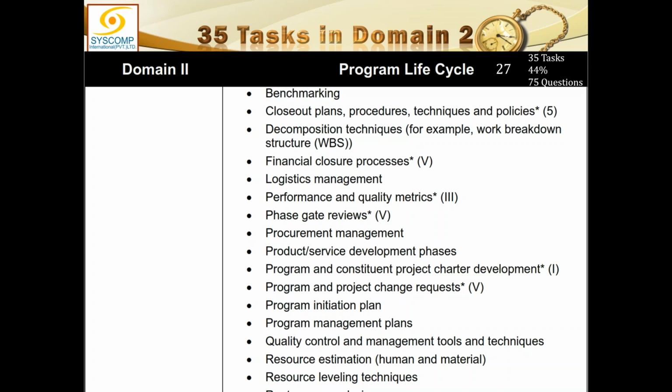For that they have certified consultants who do the gateway reviews, and especially for programs, certain standard gateways are defined, and those people are trained and certified in assessing them. These consultants check them and submit their results to the government, and the government gives the go/no-go decision on whether the program can proceed.